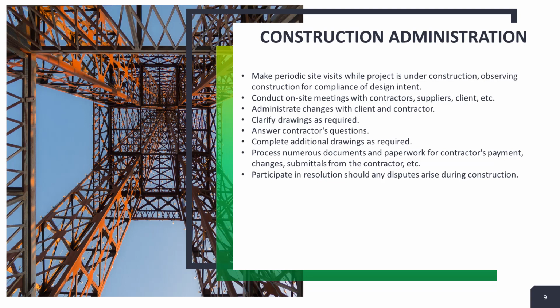Work in this phase typically includes the following: making periodic site visits while the project is under construction. We do this to make sure that they are doing things in compliance with the design intent, that the proper materials are being installed, that the temperature is correct for pouring concrete. Lots of different things that we're going to look at during these site visits.